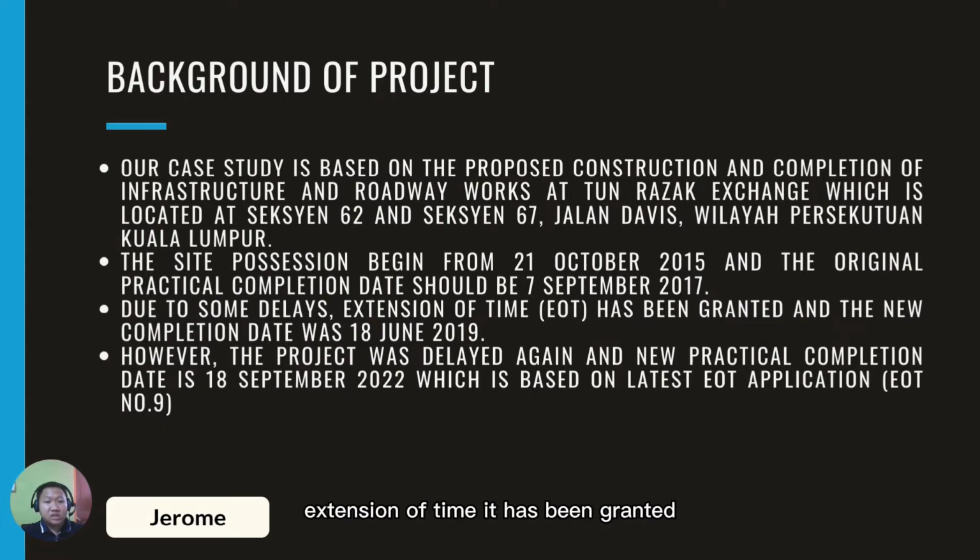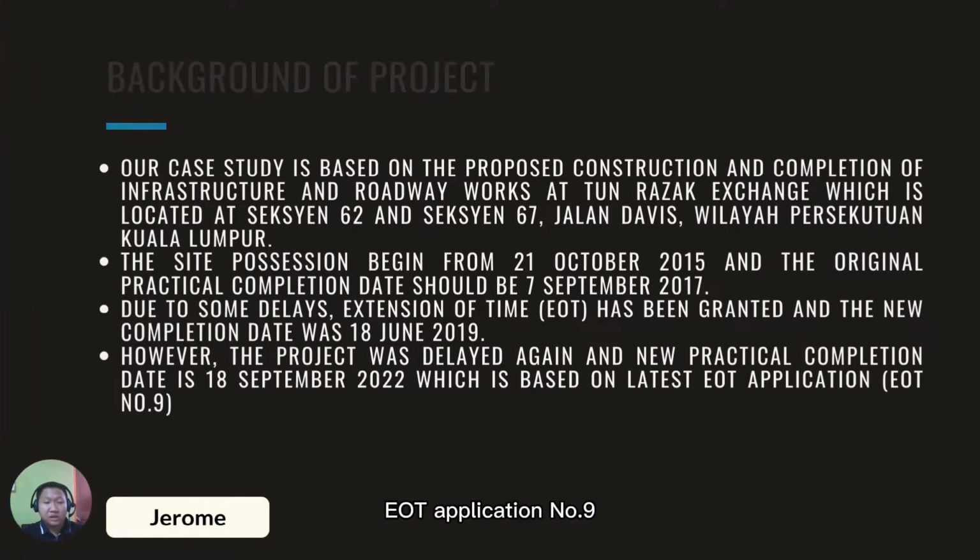Due to some delays, extension of time EOT has been granted, and the new completion date was 18 June 2019. However, the project was delayed again, and the new practical completion date is 18 September 2022, which is based on the latest EOT application, EOT number 9.